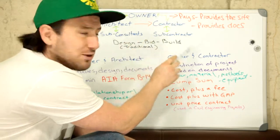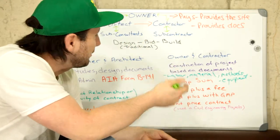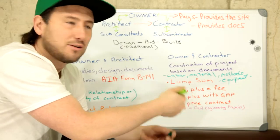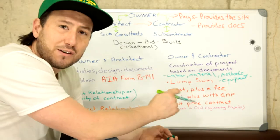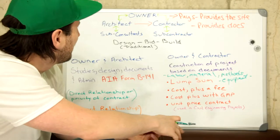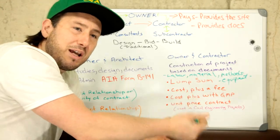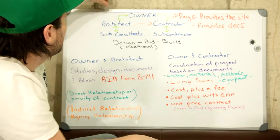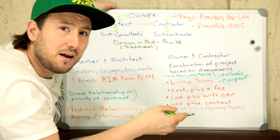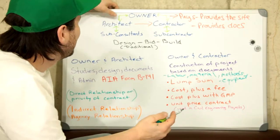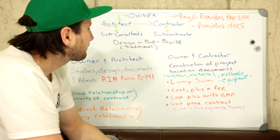The owner isn't responsible for directly paying for equipment and labor — that is the responsibility of the contractor. The contractor will put in what's called progress payments, the architect will confirm that the work has been done, and the owner will issue payment.